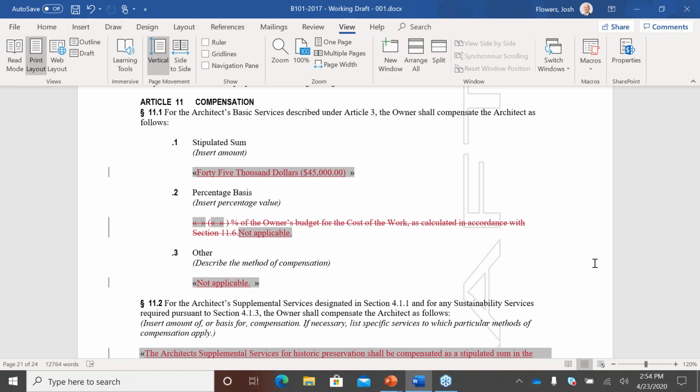It's something that if you're looking at what is the agreement that's going to be the best fit for your project, you may want to review several of the available documents that AIA has within the program. Specifically, the B105 is a short form agreement. So like Marika said, you will not see a document that's as long as what the B101 is. And you can see this example document is 24 pages. So the B105 is much shorter and does not include a lot of the terms that are in this agreement. So you may want to see, do you think that that's a better fit for your project and the complexity?